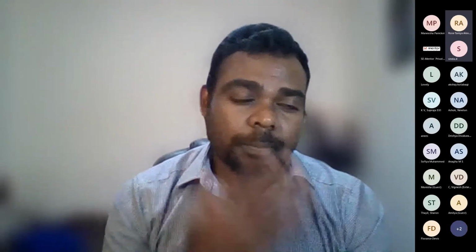This t-shirt sizing is mainly considered for product owners. When they come to you, they say, this looks like a large. Can you do a refinement and add some more details so that we can place it? Okay, this story is a 2 story point item. That's roughly estimated. When you story point it, the developers add more details and information, and then it comes to a point that you can place some points for that.